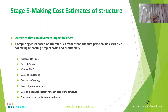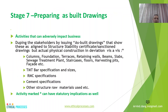Stage 6 covers cost estimates for the entire structure. The structure is one of the most important contributors to total project cost, including bars, cement, shuttering, RMC, labor, and fabrication costs. Rather than using a thumb-rule basis — such as saying the structure cost will be a fixed amount per square foot — one must use first-principle costing.